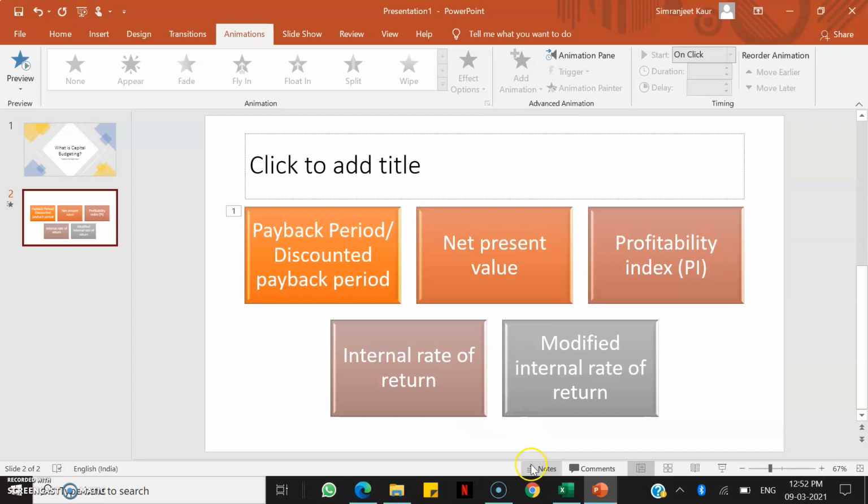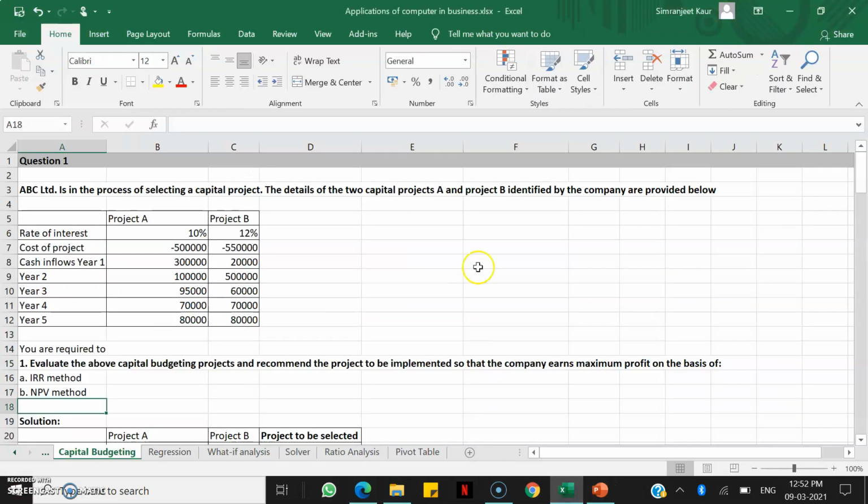So net present value is basically we are calculating all our inflows from the project and all our outflows, and then we take a net inflow, right, by deducting the outflows. Whereas for internal rate of return we take all our inflows and outflows into consideration, and we compare it with the minimum basic return that we must get, right? If our internal rate of return is higher than that, then we accept the project.